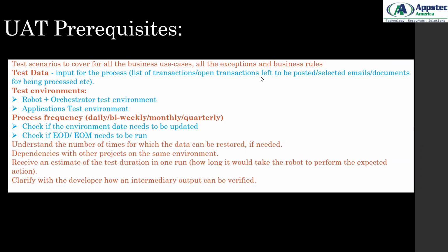If you are doing the initial planning of your RPA cycle, you would be working with your project manager, who is accountable for setting the deadline. The development deadline always has to come from the developer, and the solutioning deadline from the solutioning person. So your project manager and you would coordinate with the solution architect and the developer to get their time frames. Once the solution is ready, you talk to the developer about when development can start, and once development is done, you talk to the client about when they can start testing.